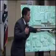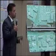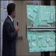Essentially, I'd have to point to boards that don't exist, but instead of running along this side of the right-of-way, we're going to have the utility company move their main fiber line to the opposite side. They'll do that through a mole bore, which is a trenching piece of equipment that allows them to do it with just an entry and an exit hole. So the short answer is we won't be running trains on PVC. Where we do have to cross the tracks, you're absolutely correct, we case it so that that is not a concern.